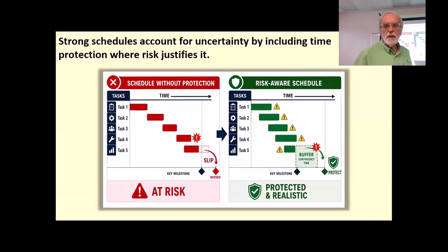So we talked about risk response and contingency management. This is where schedule buffers come in. A buffer is a deliberate time allowance placed to protect a milestone, a sequence of work, or the overall project from foreseeable uncertainty. This doesn't mean adding arbitrary padding everywhere. It means making a risk-based judgment about where schedule exposure is highest and where the protection is justified.